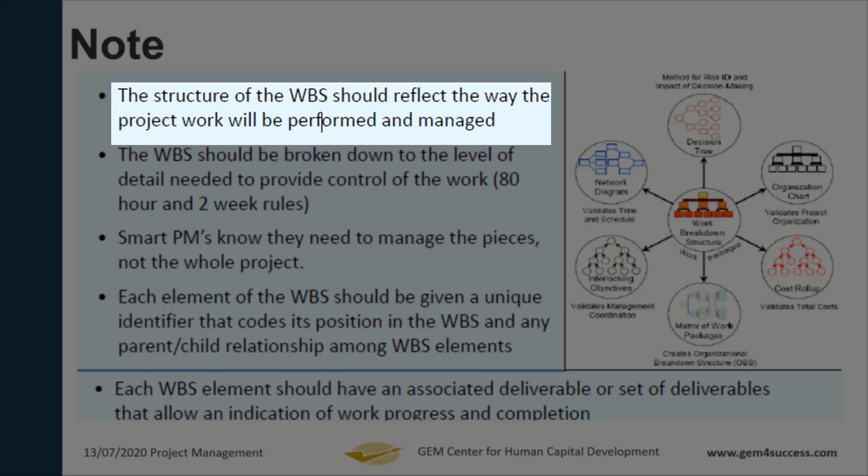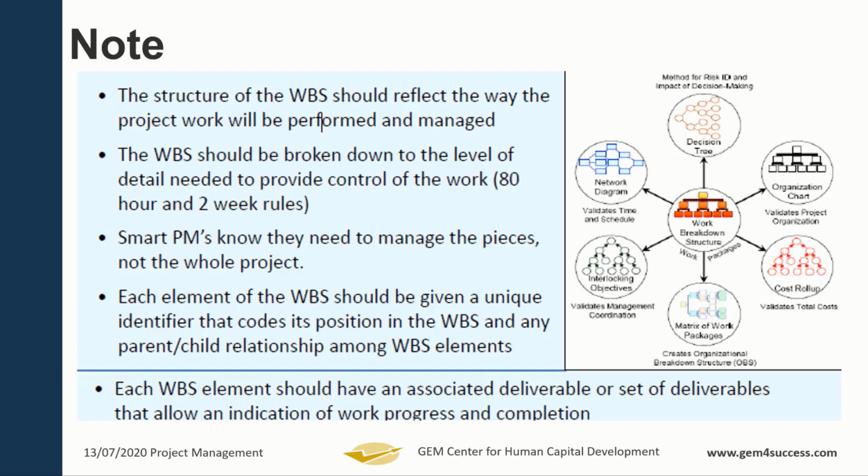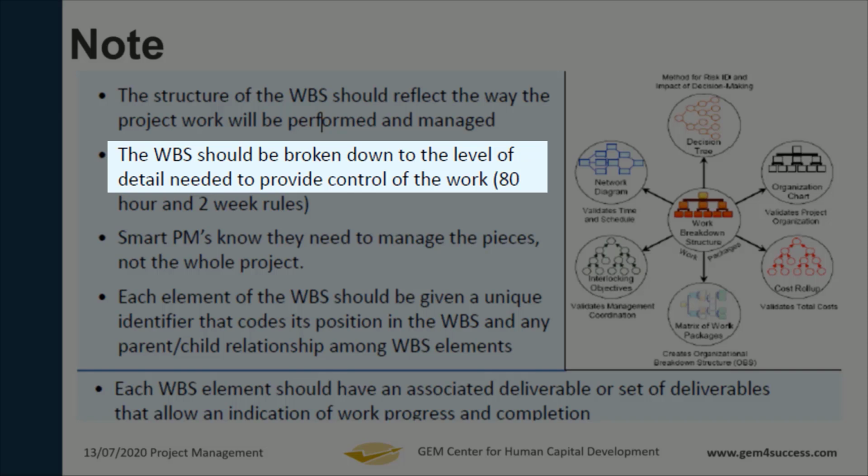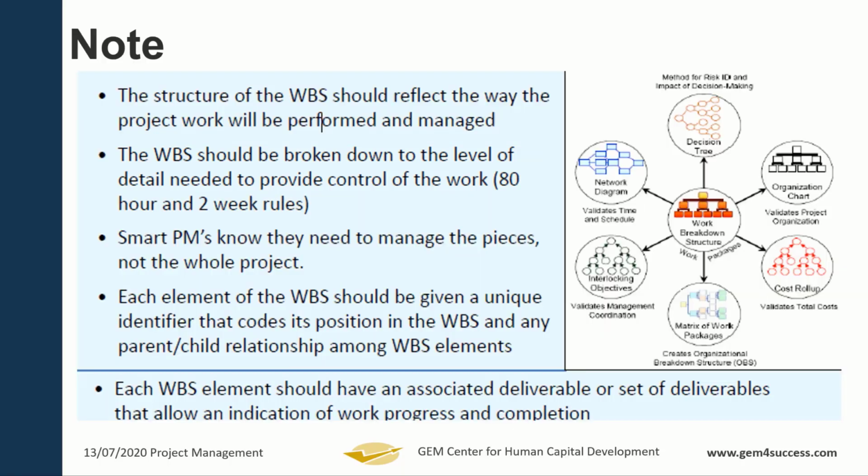Please note that the structure of the WBS should reflect the way the project will be performed and managed. So you don't just draw it in a haphazard way. The way you want to manage the project should reflect in the structure of your WBS. The WBS should be broken down to the level of detail needed to be able to provide control on the work. And then we gave this heuristic figure, maybe 80 hours, or the work that you require 2 weeks of work. Like I said, not cast in stone.